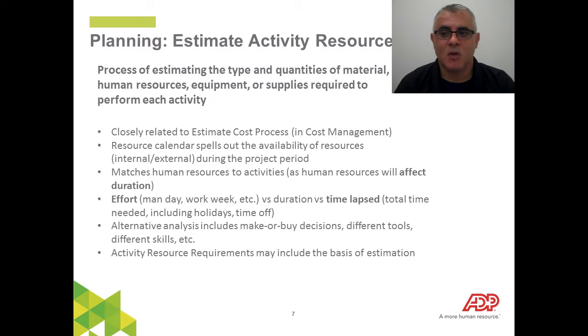So for example, we're going to get a backhoe and we're going to dig the ditches for, let's say, the sewage system of our house, but we haven't cleared the trees yet, and that's going to take another type of equipment. We don't want to have the backhoe digging the trenches for the plumbing before it's even ready for them to do that.